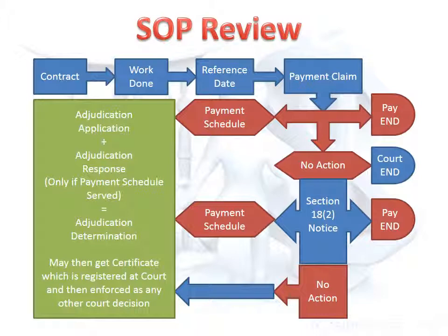If no payment schedule is served, you may apply to the court for an order, or you may serve a Section 18(2) notice of your intention to go to adjudication. If you serve a Section 18(2) notice, it must be served within 10 business days from the due date for payment of the payment claim. The client has another opportunity under the Section 18(2) notice to serve a payment schedule within 2 business days.